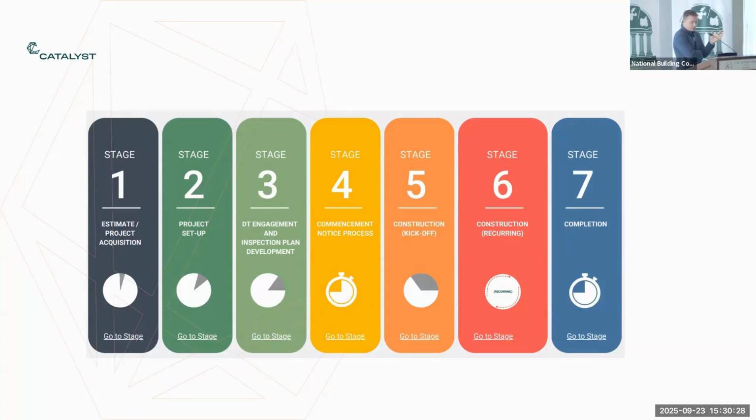Same with ventilation calculations. Without those, we don't know if we're relying on passive ventilation, active ventilation, or a mix of both, depending on the various parts of the building. So we need to set that out. That's something that we do request early and upfront as well.